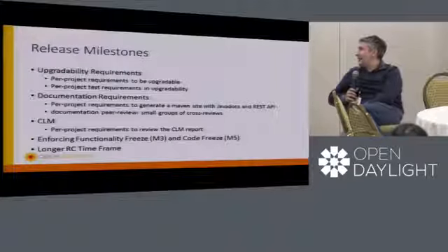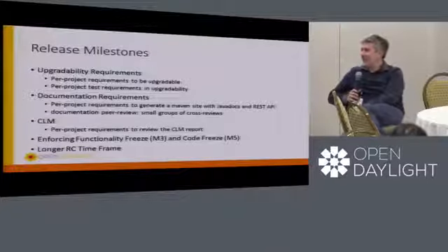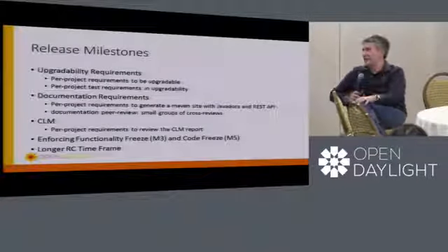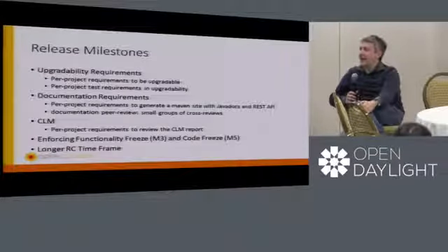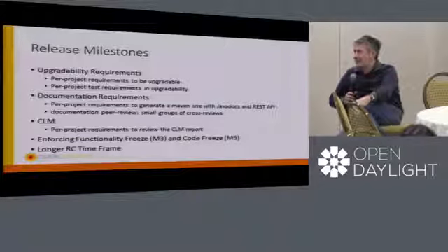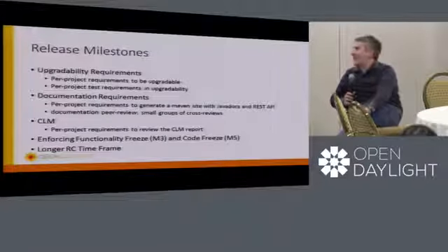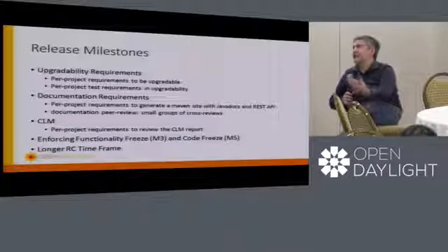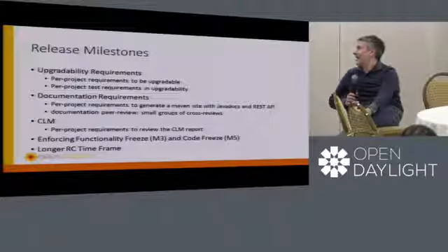Actually, I don't know exactly. What really makes projects look at the testing is whenever we start generating the release candidates. It's not even that when you see the code freezing, the people are really freezing the code, some of them at least. But definitely when you give a release candidate and you ask projects to test with the release candidate, that is where I see people really stop coding and then try to test and then try to fix. So in the 6 months cadence, I think we might need some more time.